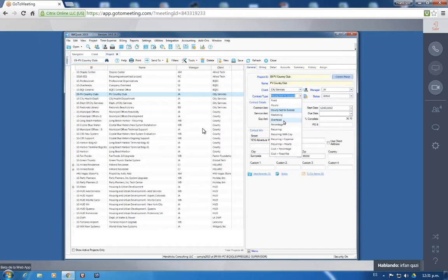Yeah. Okay. So that will be the overhead project. Perfect example is Francisco. Make sure you explain it to them that today, 4 of you are doing a demo with me. If you go in your system that you already have, and you need to keep track of that 1 hour of time, what are you going to put it towards? You're not going to put it towards your client's project. You're going to put it towards your internal overhead project. Yes. And that will be responsible for sick, vacation, holiday time, meeting time, meeting like this one, and Christmas party time, and any time that is not project related, but it is your internal overhead time, you put it towards the internal overhead project.